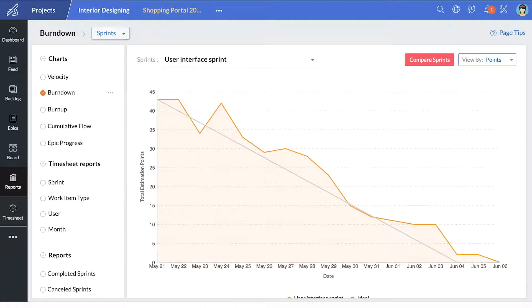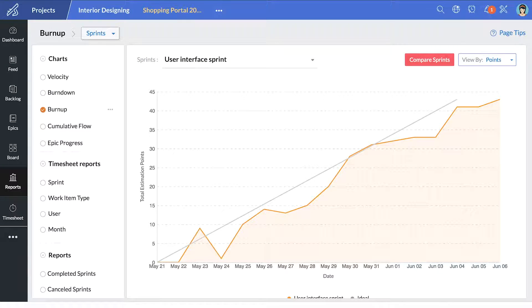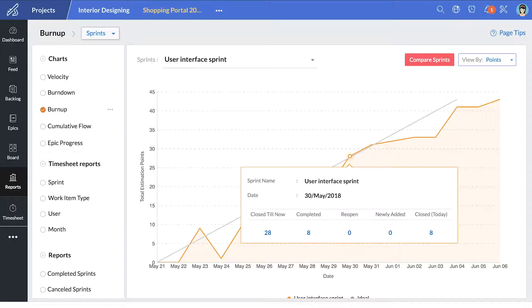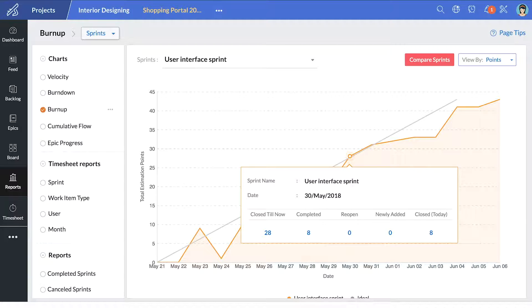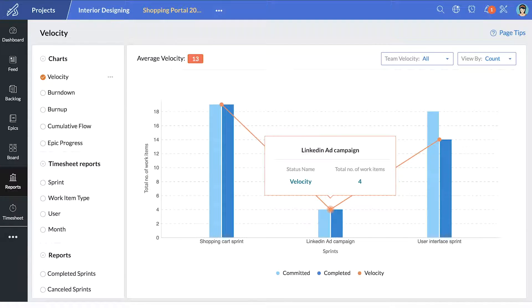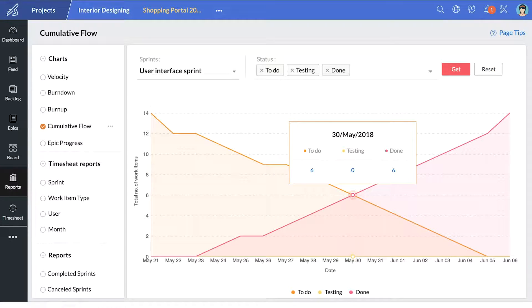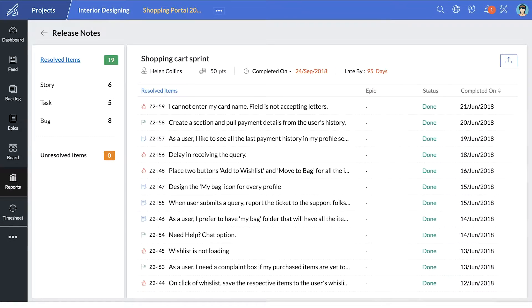Under Reports, the Burn Down and Burn Up chart gives you the pace of your team and offer insights on the work completed. To analyze your sprints in detail, you can use the velocity chart, the cumulative flowchart and release notes.